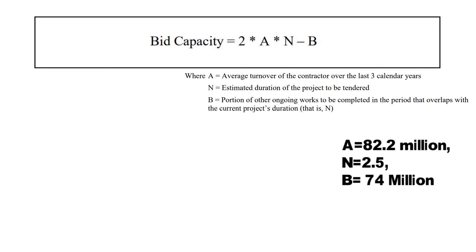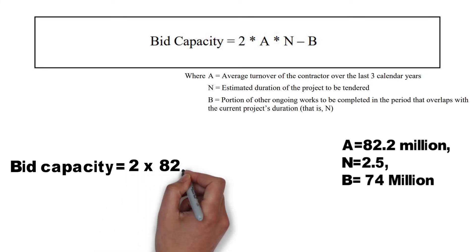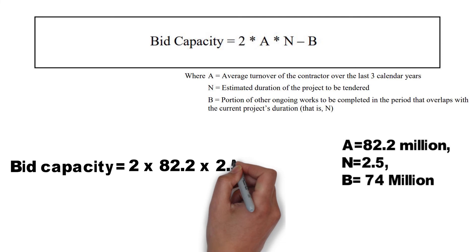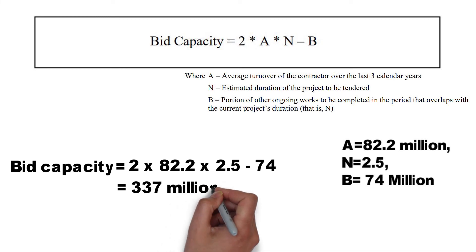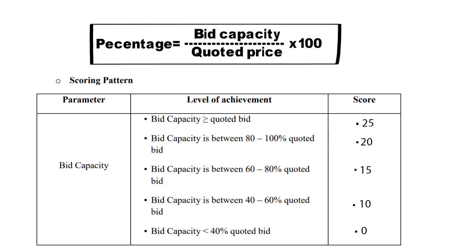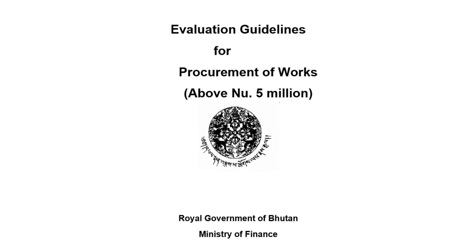Therefore, bid capacity in this case will be equal to 2 × 82.2 × 2.5 − 74, which equals NU 337 million. Compare this amount with the quoted value of the contractor for the tendered work. A contractor can score anywhere between 0 and 25 depending on how close his bid capacity is to his quoted price. Hope this video was helpful to understand the calculation of bid capacity. Please refer to the evaluation guidelines for more details.